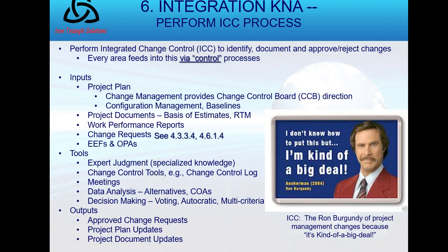So integrated change control then. Moving on to the inputs, page 116. These include the project plan, of course, which you might then consider the change management plan, because that's going to provide direction to your CCB, your change control board. Remember, you as the project manager built the project plan. You built the change management plan. These were your inputs that were approved by the sponsor to run your project. And it's going to give direction to the configuration management we just talked about in the baselines.